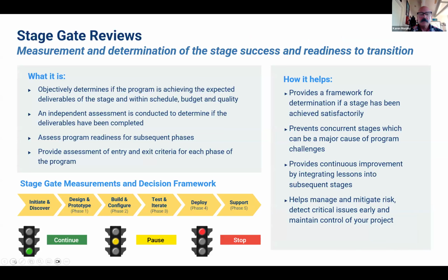Okay, next tool set we're moving on to is stage gate reviews, and it feels like it could be very waterfall in the day of agile these days, but I still find the agile projects tend to have phases, and it's still important to understand if you're ready for the next phase of the project. I like saying multitasking is merely the ability to screw up more than one thing at a time. So it's not good if you're trying to design things when you're in test, or you're trying to go live and there's still open design issues on things.